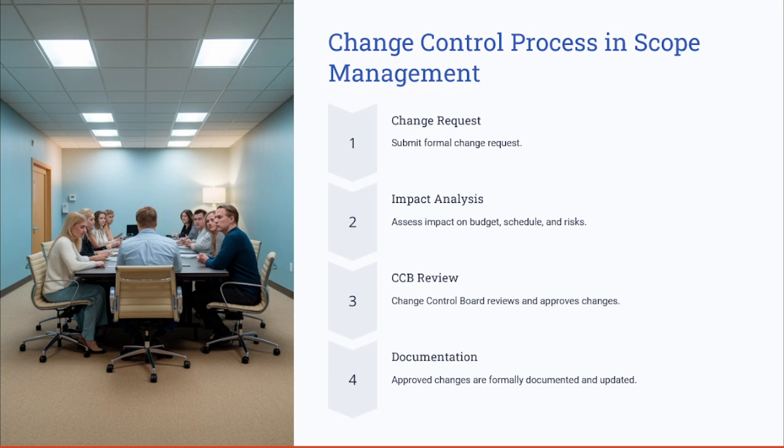The change control board is the authority, the team who reviews and approves the scope changes, and the change requests should be assessed based on their impact, schedule, risks, and overall project constraints, and that change request will be evaluated by the change control board. If the changes are approved, they are formally documented and updated in the scope baseline.